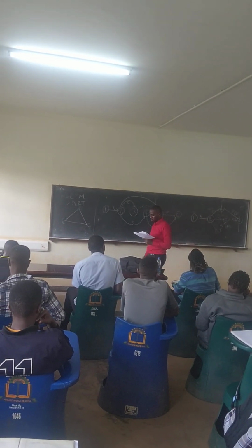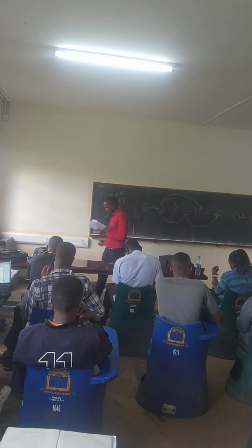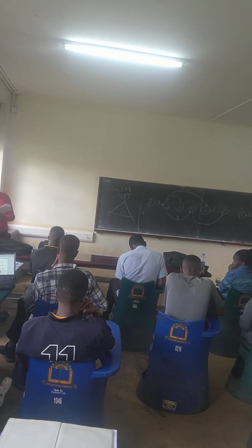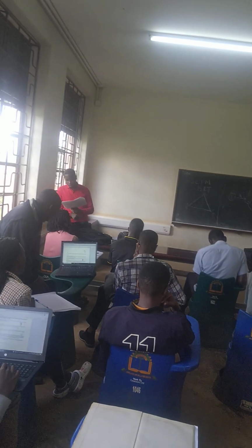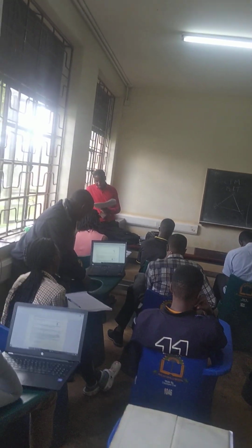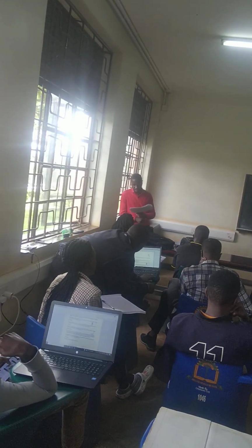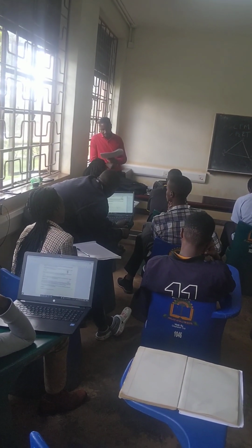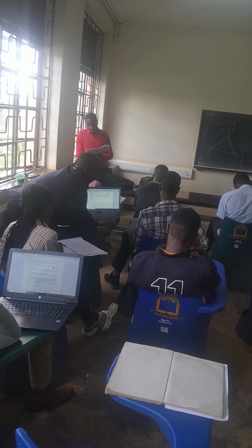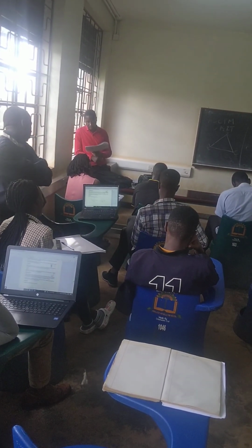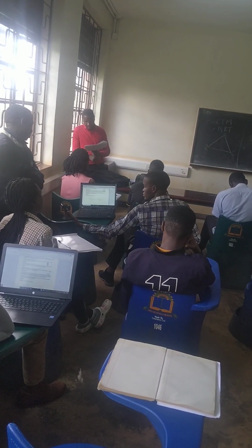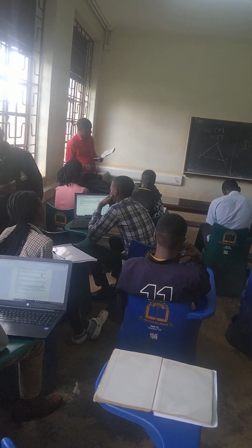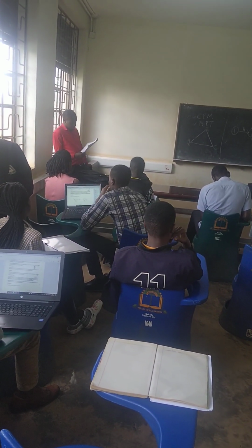And the next is independent float. We are saying that this is the amount of time an activity can be delayed when all preceding activities are completed as late as possible, and all succeeding activities are completed as soon as possible. Let us read this again. They're telling us that this is the amount of time an activity C can be delayed